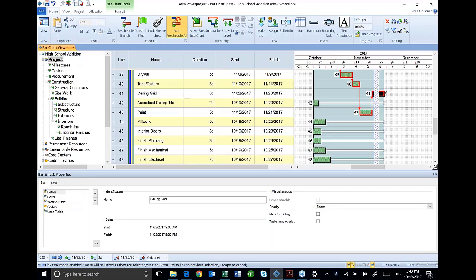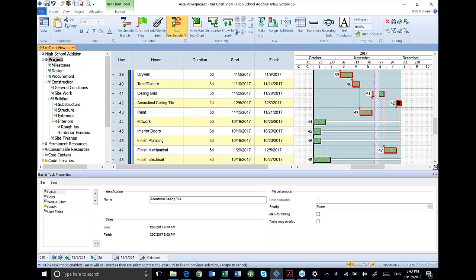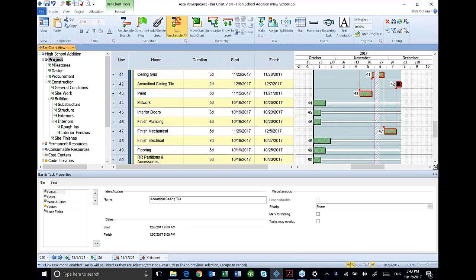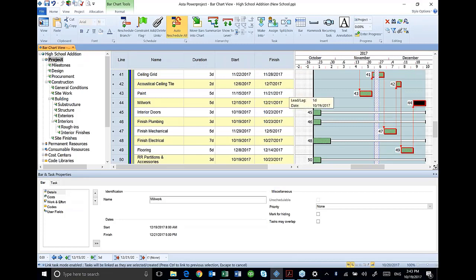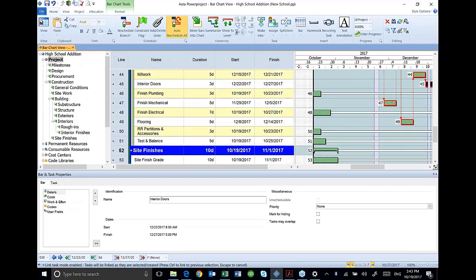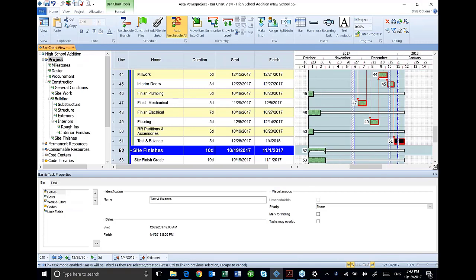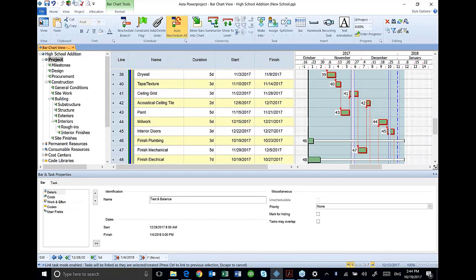So from ceiling grid, I'm going to install my air vents. And then from there, once I get those in and my electrical in, I can do my ceiling tile. After I do that, got everything overhead, I'm going to do my flooring. And then my mill work. And then my doors. And then I will do my test and balance. So that's a sequence. So the order that I selected those, it actually created the logic in those orders.